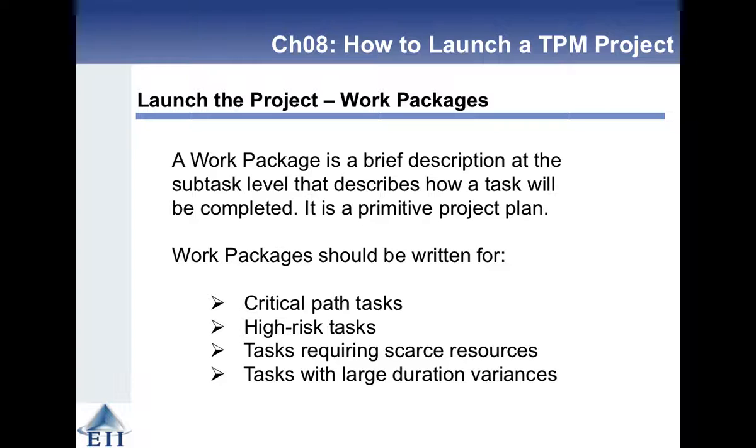So a work package is a brief description at the subtask level that describes how a task will be completed. It's like a primitive project plan. It should be written for critical path tasks, high-risk tasks, tasks requiring scarce resources, and tasks with large duration variances.